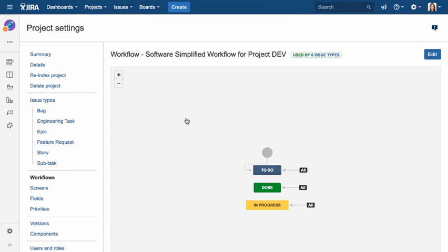Looking at this workflow, you can see it's a simple 3-status workflow with global all transitions. This all transition means that any issue in any status can transition to the status it is pointing at. These are great for processes where there are very few constraints on the path an issue can take through the workflow. It also doesn't make screens appear when users transition the issues. However, it's not very good if your process requires an issue to transition through its workflow in a more controlled or formal manner, where screens appear in certain transitions, allowing users to populate fields on the screens.